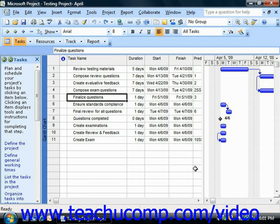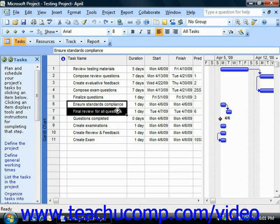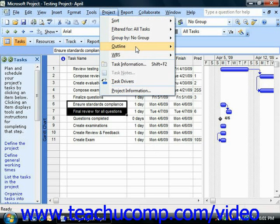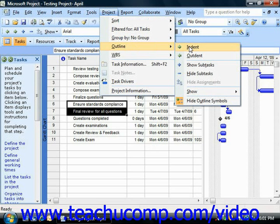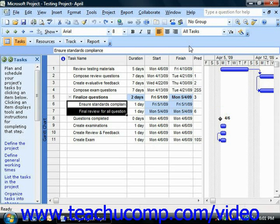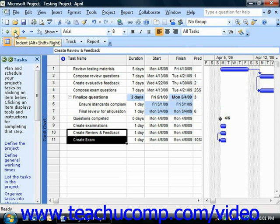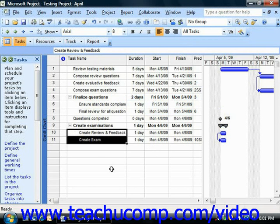Once you have that done, you would next select the tasks that appear below the summary task that make up your subtasks within the phase. Once these have been selected, you can then choose either Project from the menu bar, roll down to Outline, and then choose the Indent command, or you can simply click the Indent button in the formatting toolbar instead. Either way, the selected tasks will be grouped as subtasks below the summary task or phase.